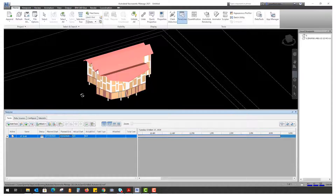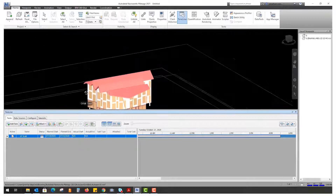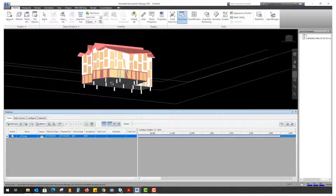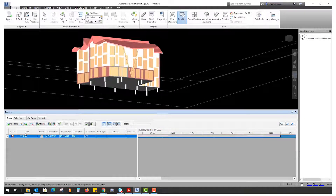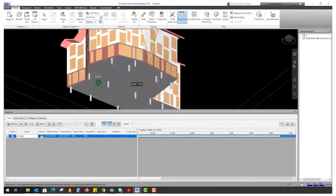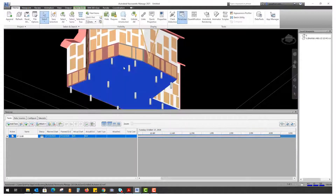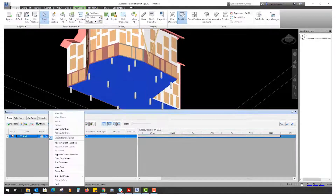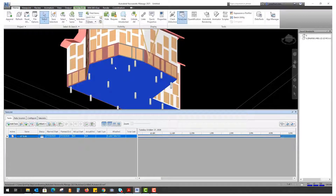Now the way we assign objects to the task — and this is just one way of doing it — we go into our model, select it, and make sure you have your Selection tab active. Then select the ground floor, right-click on the task, and choose 'Attach Current Selection.' That floor slab is now attached to this planned start date and planned end date.